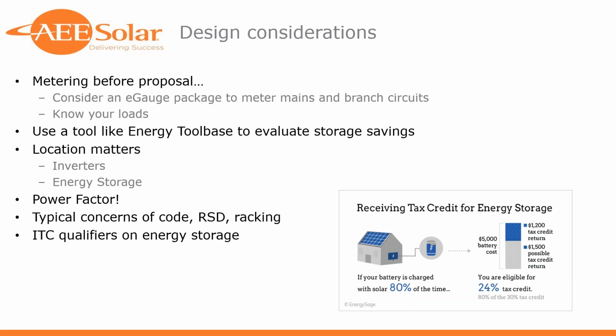In years past, those requirements have been geared with a timeline of interconnection or plan approval. For 2019, it will be installation. So, you know, even if you're grandfathered in with an interconnection agreement that had previously been granted, or stamped plans, if you're installing January 1st or later, you're going to have to be compliant with that new standard.